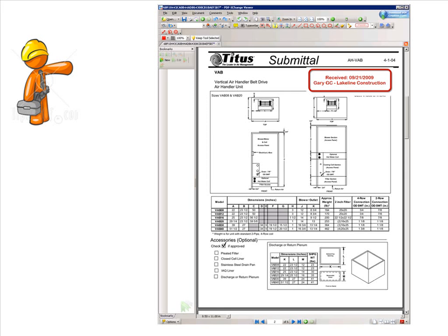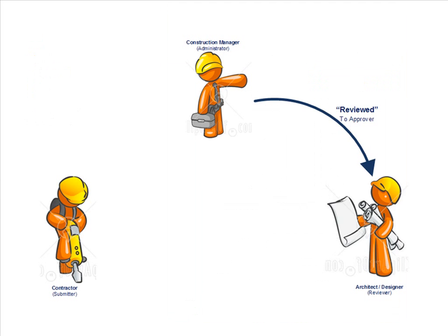And stamping in usually means putting a cover page or stamp directly on the documents that have been submitted to indicate the date it was received and that they believe that it has been reviewed and is ready for the acceptance or the approval by the architect or the consultant and engineers. Once the general contractor and CM has completed the stamp-in process, they will then transfer the information to the reviewer to be reviewed by the approvers, the architects and the design team.